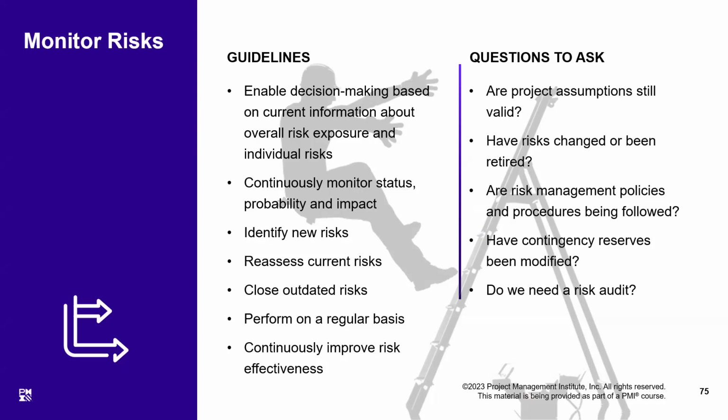So in the monitoring stage, you must ask some questions of yourself. For example, are the project assumptions still valid? Remember, I did tell you that project assumptions, wherever we have taken them during the planning, are the biggest candidates to become risks at any point in time.